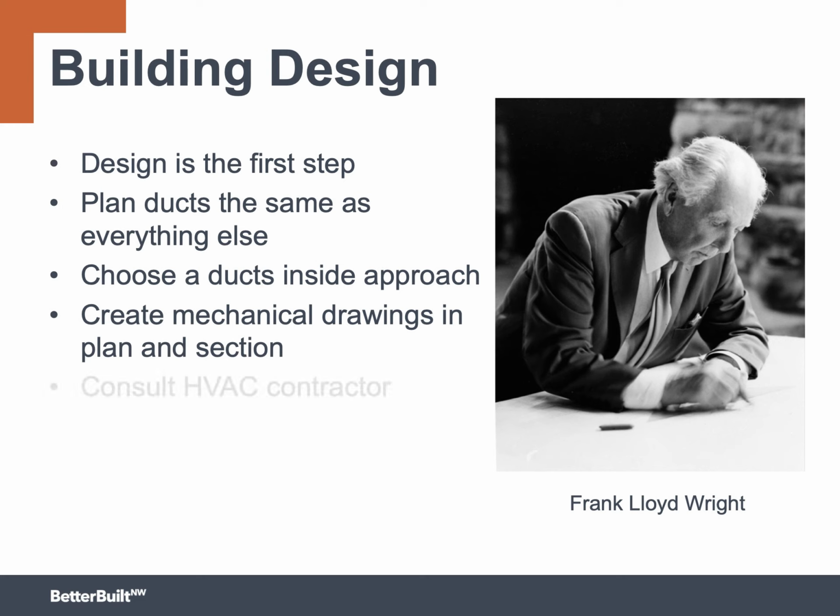In doing this, you'll want to consult the HVAC contractor because they're going to help you understand the size of the ducts that are needed and some of the limitations, perhaps on the way the ducts have to run, the fittings and the grills, etc. It's essential to involve the HVAC contractor early on because it's really important to have all of the information on the building plans. A lot of people are tempted to create a set of plans that are really just for plan review, but really don't go beyond that.